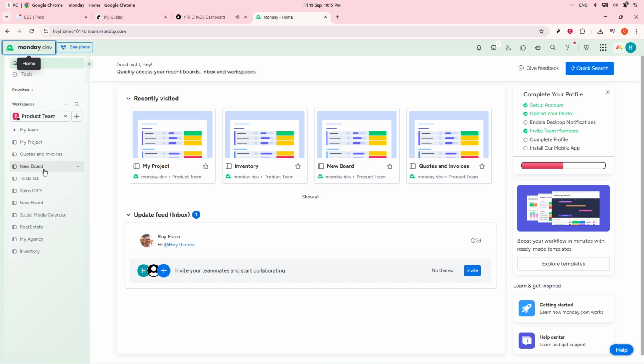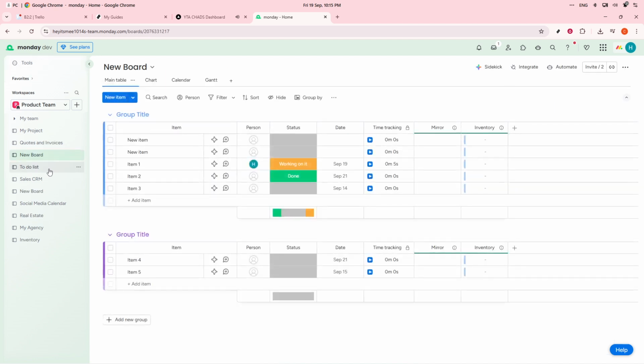First, we need to identify your workflow. Begin by outlining the process you wish to manage. Think about the major tasks involved and break these into stages or steps. For instance, if you're working on a project workflow, your stages can be as simple as planning, in progress, review, and completed. Visualize this as a blueprint that will guide the entire setup process.